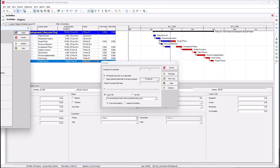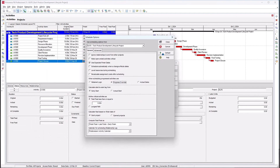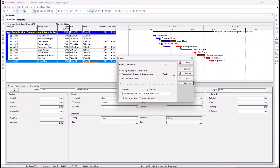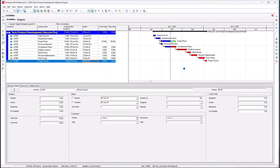Now let me apply progress override and see what happens. Look at the development phase — it's now showing that it can continue, even though we originally planned to finish design phase before starting development phase. All the successor activities follow suit as well. So in this case it's not respecting the logic — we are now out of sequence because we're not following the original sequence anymore. That's how retain logic and progress override work in Primavera P6.